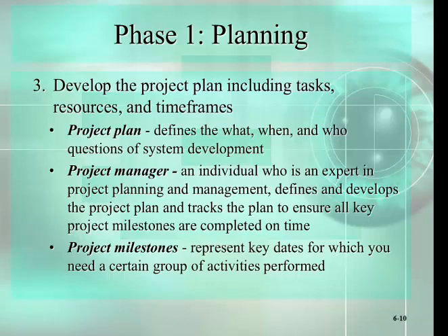The third one is to develop the project plan. The project plan includes tasks, resources, and time frames. The project plan defines the what, when, and who questions of system development. A project manager is an individual who is an expert in project planning and management. The project manager defines and develops the project plan and tracks the plan to ensure all key project milestones are completed on time. Project milestones represent key dates by which you need a certain group of activities performed.